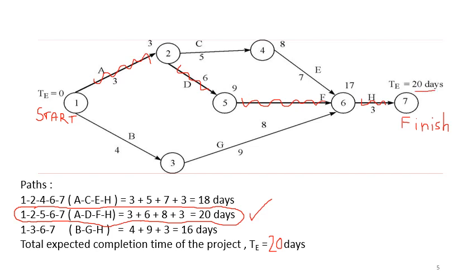You may be a consultant who has planned and who has told your customer that the project can be completed in 20 days, and then you're told that these are the critical paths, and you don't want your customer to be dissatisfied. No? You have committed 20 days for the completion of the project. So if these critical activities are not carried out according to the schedule, they will cause a delay in the entire project. So that is the meaning of these critical activities.